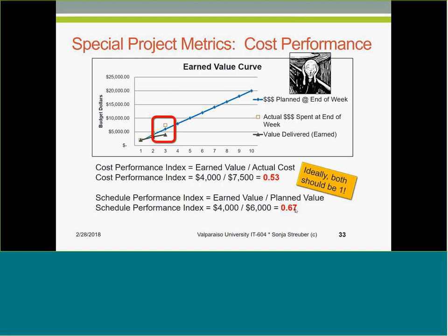So, in the ideal world, each one of these should be 1, because it means that the earned value is exactly true to the actual cost, meaning that your estimates are right on the mark. For the CPI and the SPI, where the earned value is equal to the planned value, so that the result is 1, it means that your planned value and your management of the actual work, your progress on the actual work, really coincide.